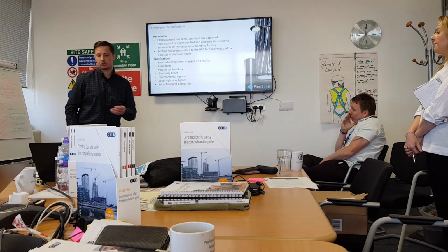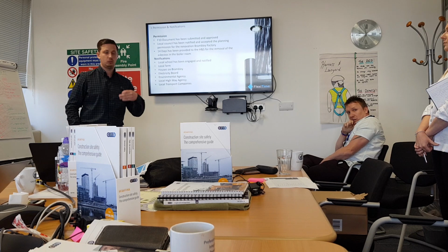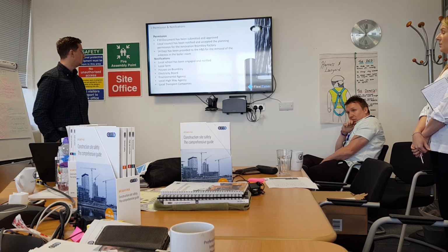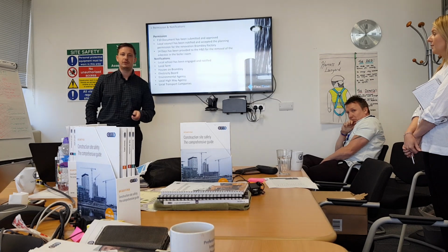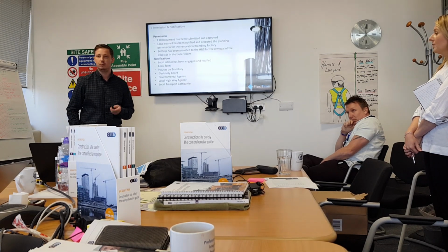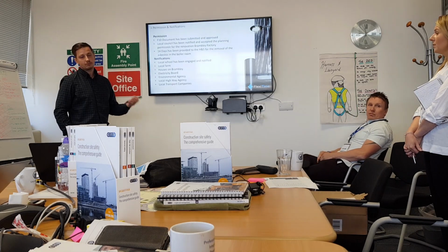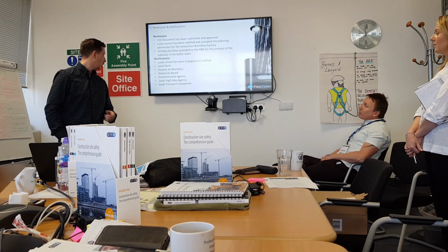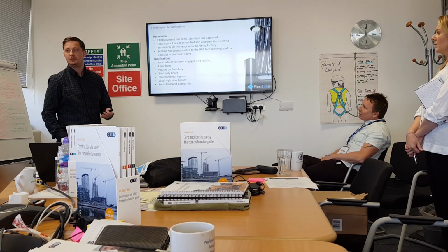Environment Agency, again I touched on earlier, because of the drains, we've made them aware, they're pretty happy with what we've shown them. Shouldn't have to do anything with that. Local highway agency, we went to them due to the fact we're putting temporary traffic lights on Bramley Road. They've signed off on that, they're happy with all that. So we're good to go there, and we've let the local transport companies know just for any delays for the community.